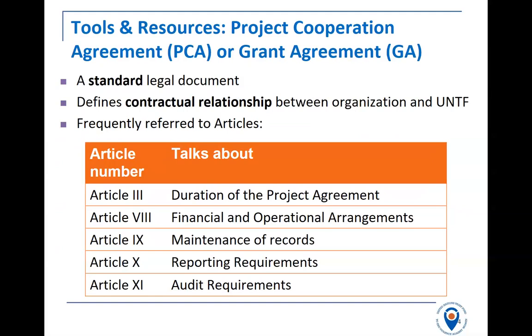That might seem obvious, but obviously that means if you incurred some expenditure before 1st of September 2018 on the project, unfortunately you cannot charge that to the project. And any expenses that occur after, say, 30th of August 2021, you will not be able to charge, apart from in the case of the external evaluation, which does happen after the project date ends.